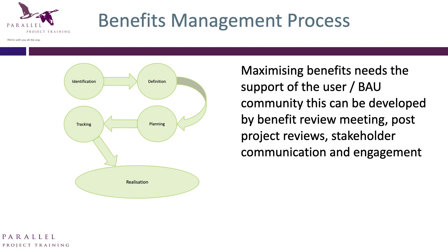On a bridge project, for instance, the benefit might be reduced congestion — and how are you going to measure that? These are challenging and interesting things to set up well in advance, but they're a little outside the normal project manager's comfort zone. The benefits management process is like every other process: first identify the benefits, then define the measures and come up with a benefits management strategy — who's responsible, how data will be collected, how it will be reviewed. Then track benefits ideally as part of core business systems. Once trackers are running, realize those benefits so you know the project had an impact.